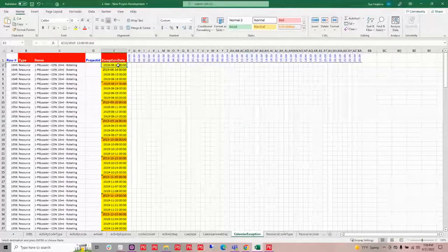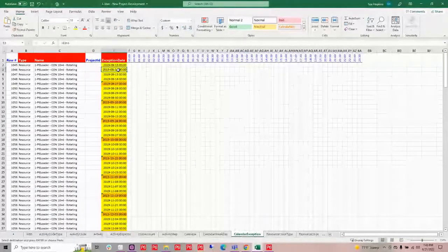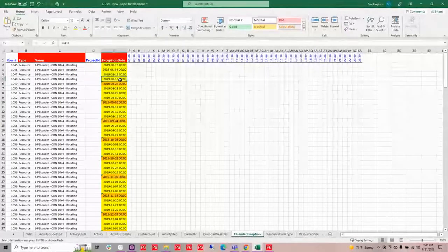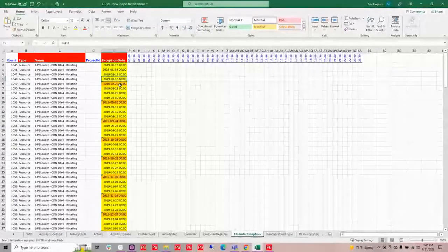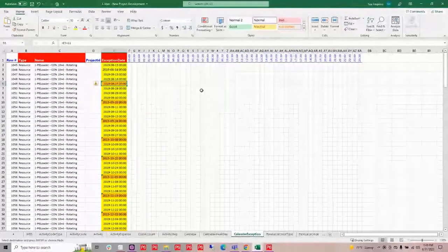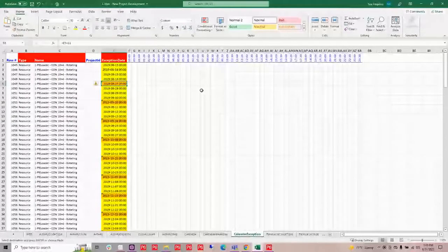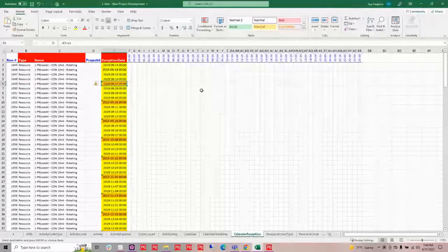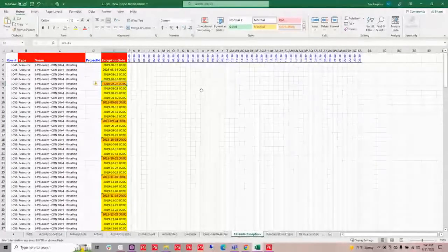So I've started with my first day, and then I've used a formula to calculate my next 4 days that need to be off. Then I'm using my 11 days to start my next series. Now, if you've ever had to go in and do a calendar like this from scratch in P6, it takes a lot of clicking the right boxes and highlighting the right boxes and putting exception to work time on that.